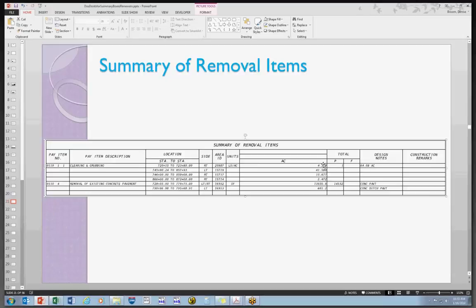I've also seen where they've tried to put a subtotal down here at the bottom, like an extra row. If it totals over here, there are no subtotals or totals at the bottom. But it's a quantity of 1. And then the total acres, because it is a secondary unit, it's just like with the days, the total is put in here as a design note.